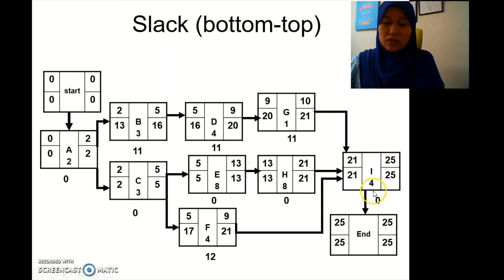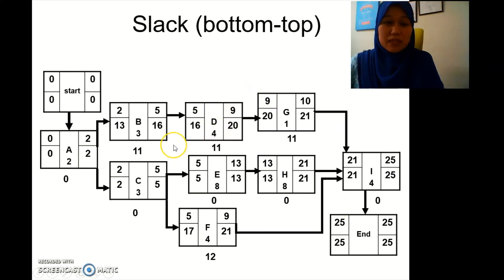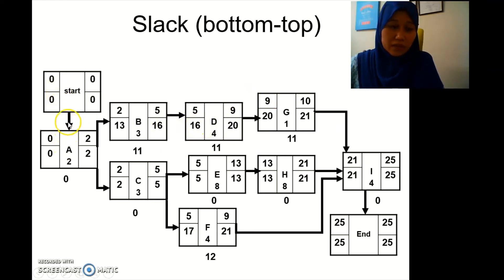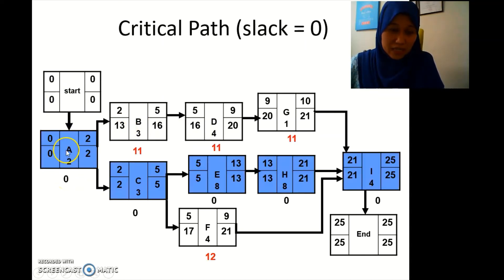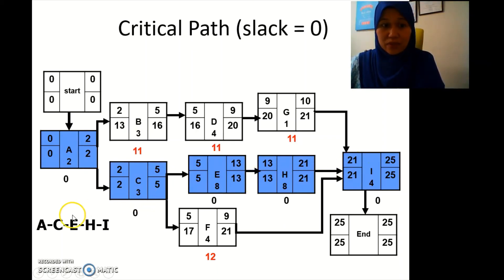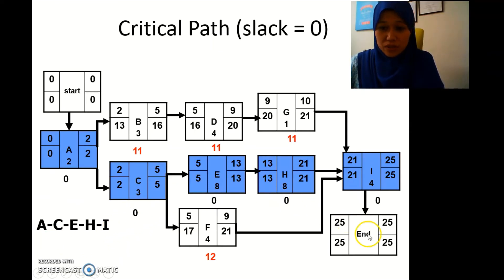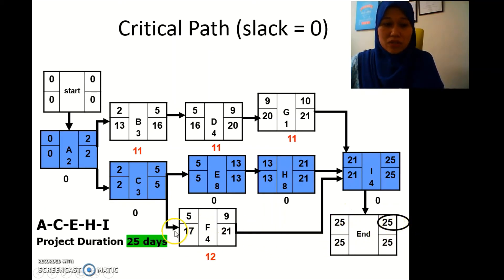The critical path is found by identifying activities with zero slack. In this case it's A, C, E, H, and I — these are the critical path activities. The project duration is the last number at the end box, which is 25 days.